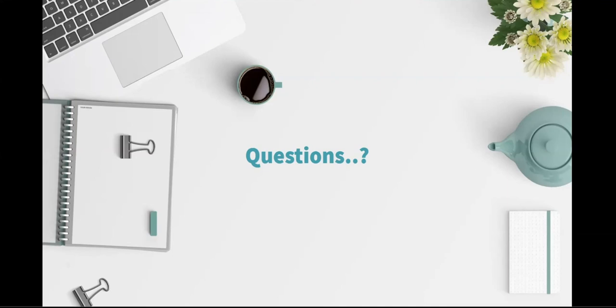So Kate, there's a next question which you could probably take. Are the percentages of resource availability always based on a 40-hour week, or can they be configured to show percentages based on part-time schedules? Yeah, so it can be configured to be based on the standard working hours of a resource and also the working days in a week. So if someone works only 3 days a week, it will be based on their standard working hours and those 3 days working in a week.